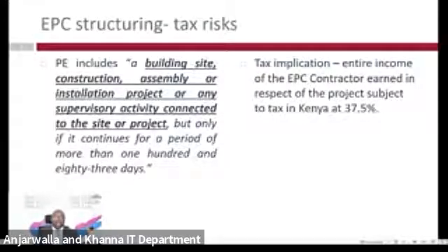And broadly, this risk will arise where an offshore EPC contractor sends its employees, its agents to come and work in Kenya for an extended period of time without a legal presence in Kenya, or where you have a legal presence in Kenya, but the employees who will be coming into the country are employees of a separate entity who are working in Kenya under instructions of their offshore employer to assist in construction, assembly, or installation of the project in Kenya.